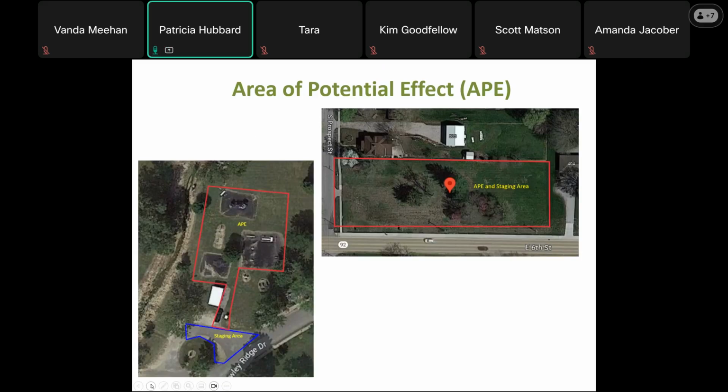The environmental review survey starts on page 36 or Adobe page 59 of the application guide. Questions 76 through 85 comprise the environmental review section of the grant application. The tables provided in this section serve as a record of the environmental resources present at your site, and whether the proposed action is likely to have a significantly negative impact on the resources or whether further information is needed to determine that potential impact.